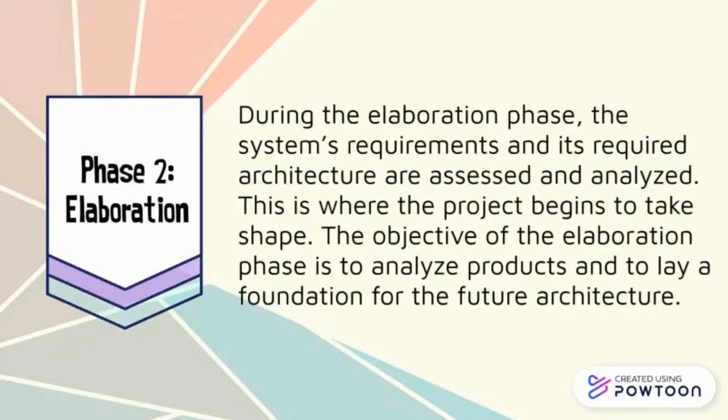The aim of this phase is to analyze the requirements and the architecture of the system, develop the project plan, and eliminate the highest risk elements of the project. It's undoubtedly the most critical of all stages as it signifies the transition from low risk to high risk. Also the point when your team has to make a decision whether to start the construction, or the development and coding, or not.